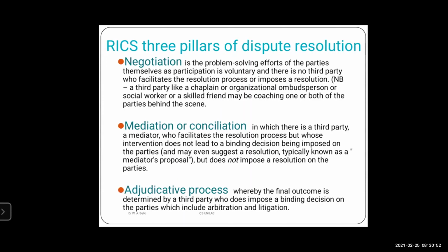And the client is saying that that variation is not before me because I didn't have budget for that. And eventually, they now have a party that has to mediate between them. That's it. No, client, this was not part of the initial contract. So, having done it, you have to pay for it. If it is mediation, or conciliation, the man may pay, may not pay.